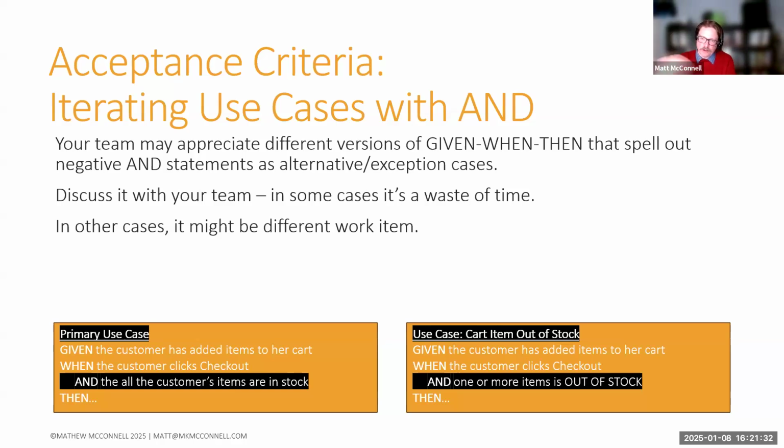So at the user story level, that might be, oh, I don't know, the customer wants to withdraw money, so you dispense cash. It might be that we need to create the checkout. It might be I need to check out using Apple Pay. It's usually an amount of work that can be performed in, I don't know, a few days to maybe a couple of weeks. I also use them at the feature level, which might be a Canadian checkout, where there's a whole bunch of user stories that we can decompose it down into.